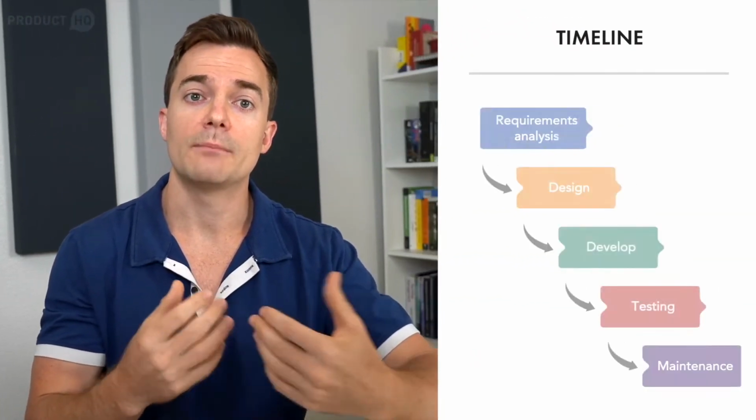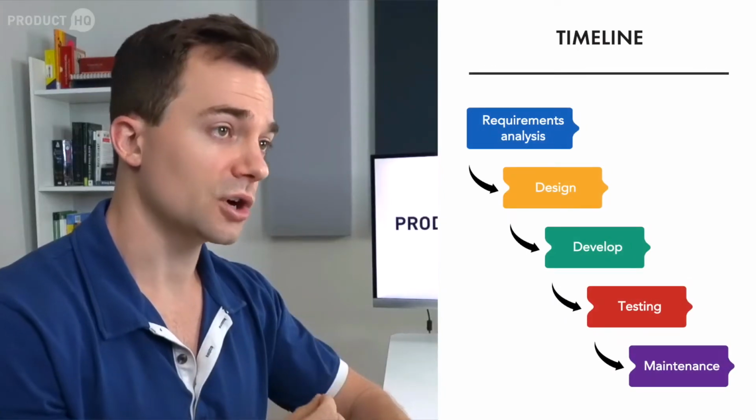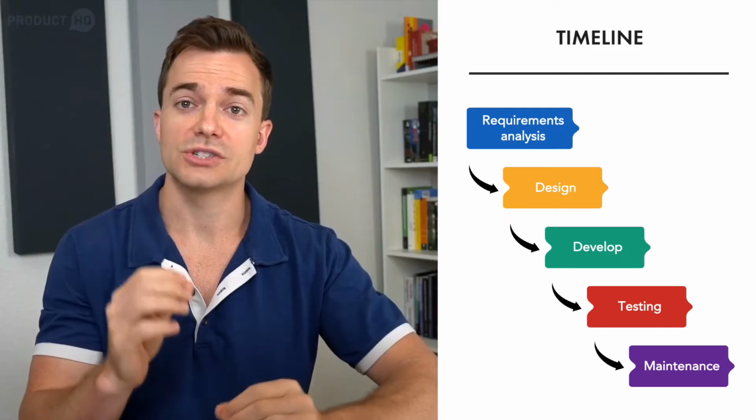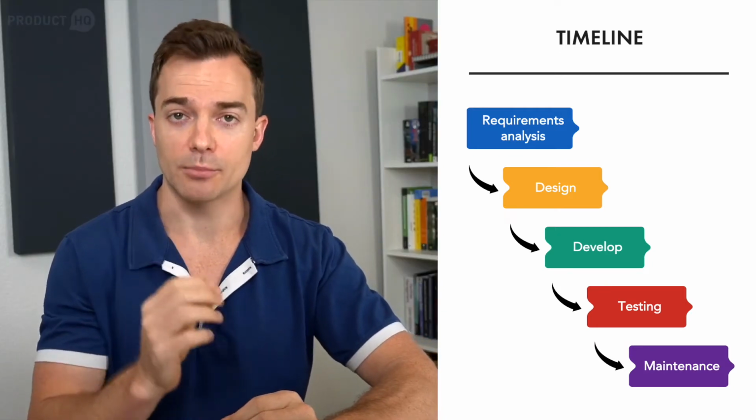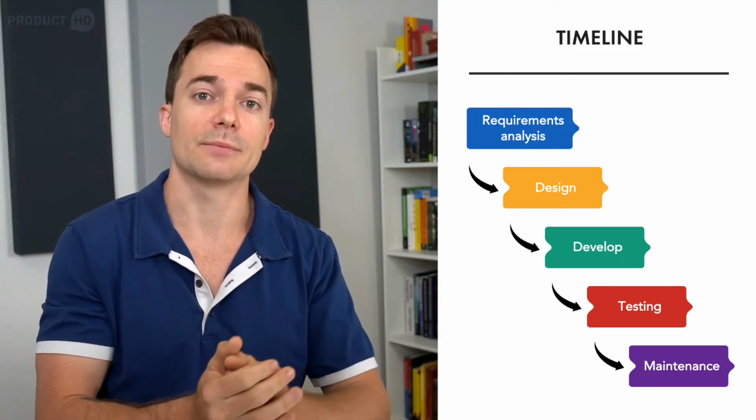So the difference number one is the timeline. The Waterfall model employs a fixed timeline from the start of the project. It clearly defines the scope of work, and all project requirements are stated from the beginning to map out a comprehensive plan. The product is delivered with finality at the end of the process.